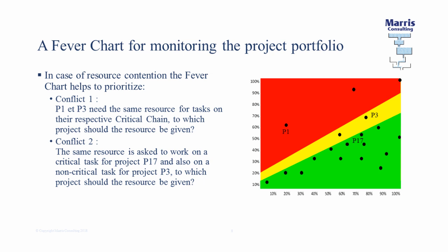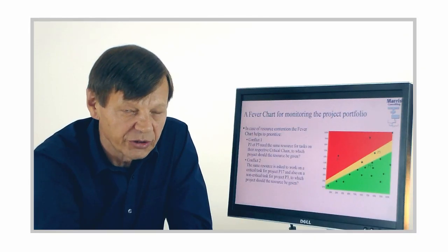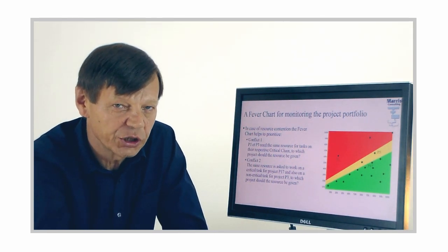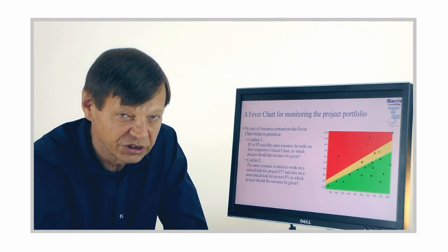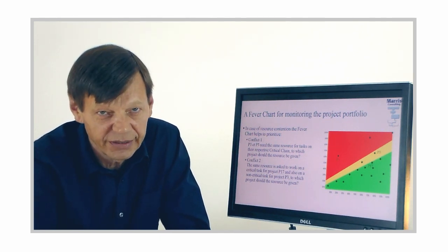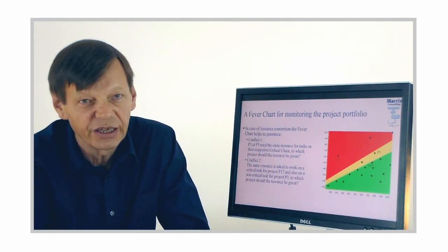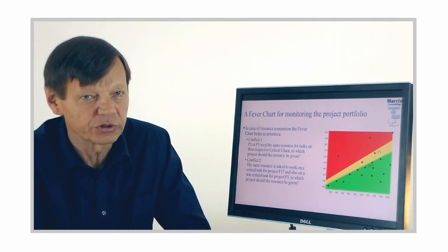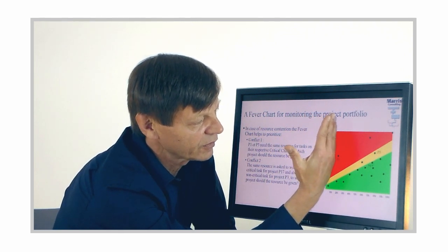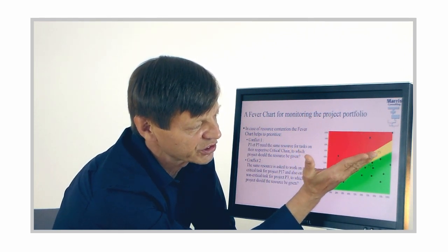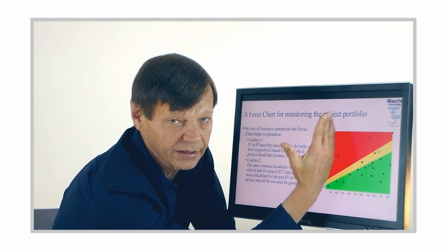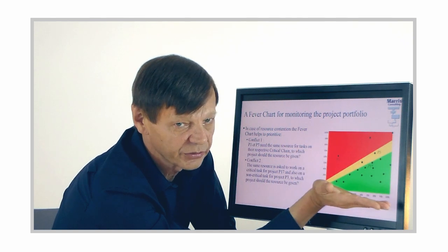Okay, well, the way of defining the priority is in fact to find the project which has the worst ratio of project buffer consumption divided by progress on the critical chain. Okay, that's the mathematical formula. In practice, in visual, it's quite simple. It means the priorities are defined in this way. Okay, you'll find the priorities by the ones further up on that ratio. Okay, these are priorities compared to those.